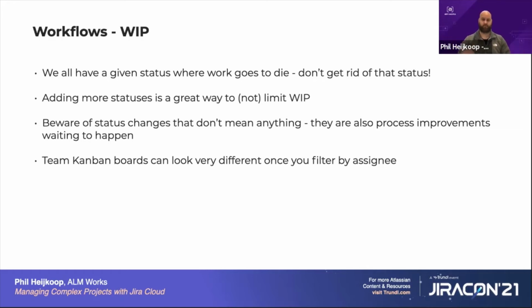It could just highlight something like, hey, we're working with customers and none of them are getting back to us. Well, maybe we should set a time limit to say, if this is taking 2 weeks and no one gets back to us, it's clearly not that important. It will go somewhere else. So there's a lot of information when it goes to these kind of terminal statuses that you can use to improve your internal processes.